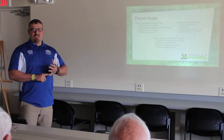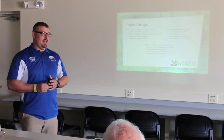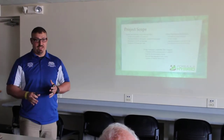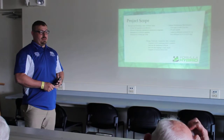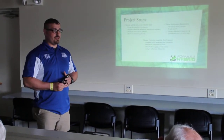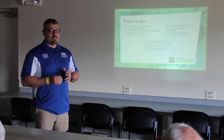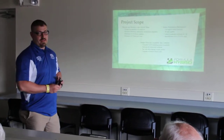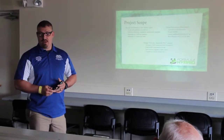We set out to have at least 10 members. We did the calculations, tried to figure out the manpower it would take, and found that 10 members working 15 hours a week would be the bare minimum that we would need to get this project done. We need good members, people that are successful in school. School comes first, even though this is a student project. So we needed people with a minimum GPA of 3.4. They knew what they were doing in class and could apply that knowledge in a competitive setting. And again, the time consideration: good students that had the free time to spend in our lab.